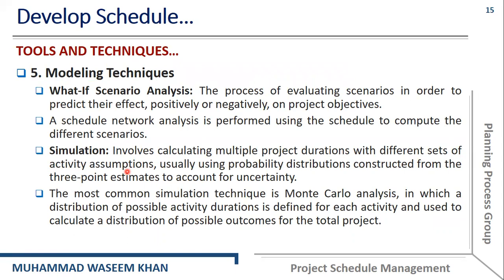Another technique or tool that we can use here is the modeling technique. And modeling technique includes what-if scenario analysis and simulation. What-if scenario analysis is the process of evaluating scenarios in order to predict their effect, positively or negatively, on project objectives. Okay, so a schedule network analysis is performed using the schedule to compute the different scenarios.